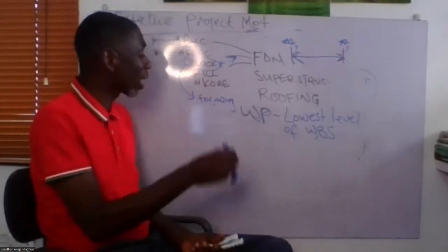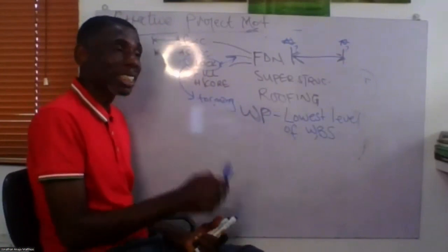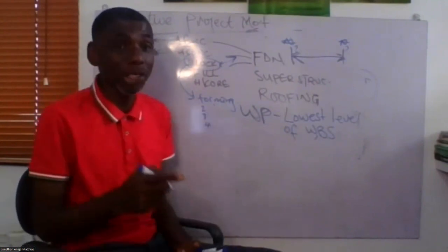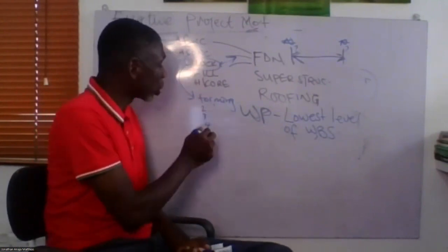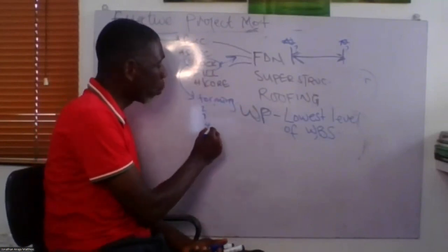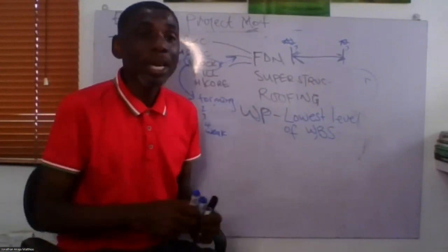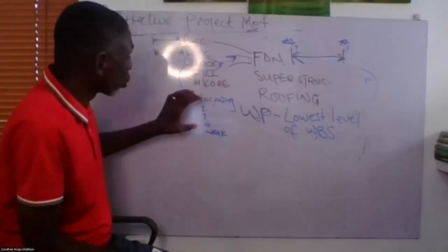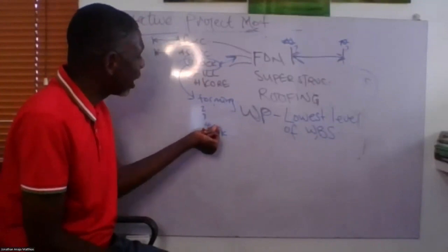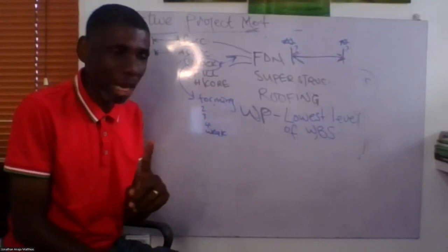He may need to estimate duration for forming separately, and estimate the duration of the second, third, and maybe fourth courses of the foundation separately. He may also need to estimate the cost and time required to do the weak concrete in the block holes separately.